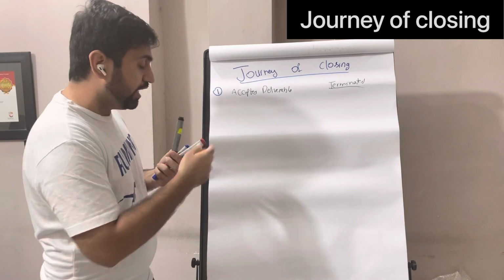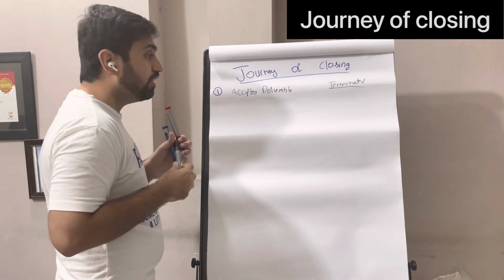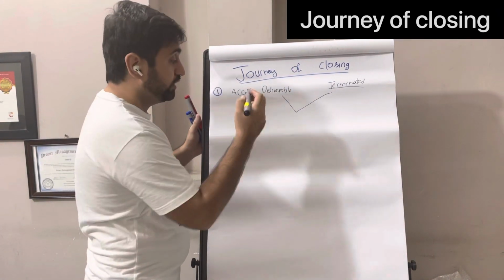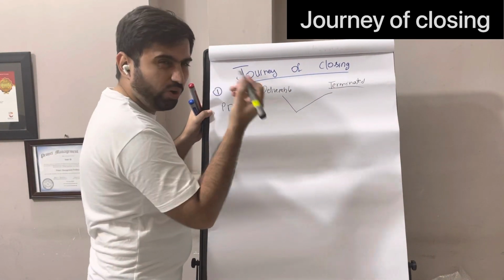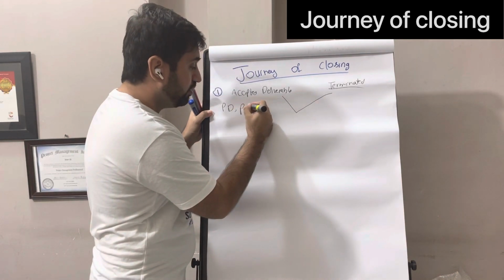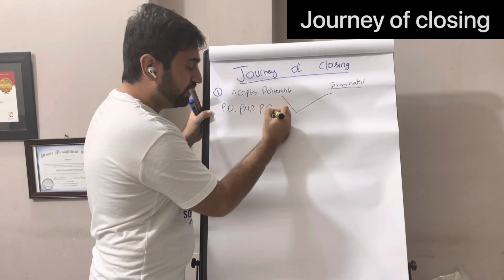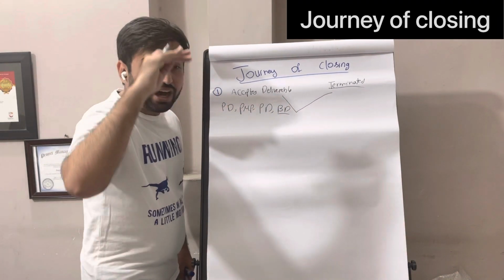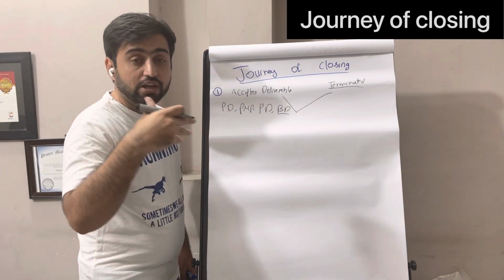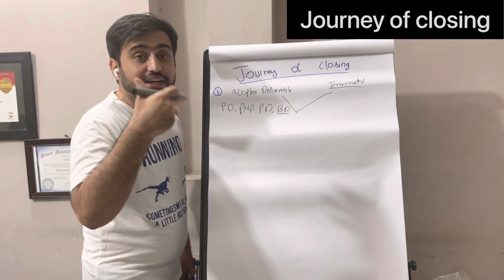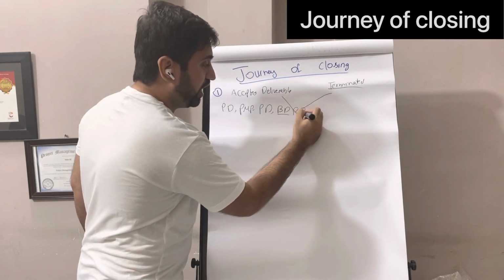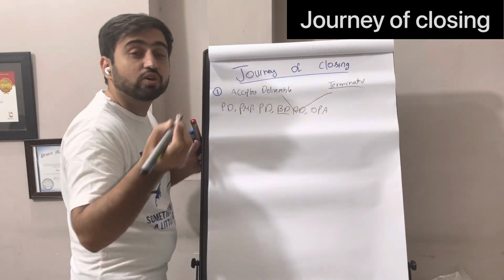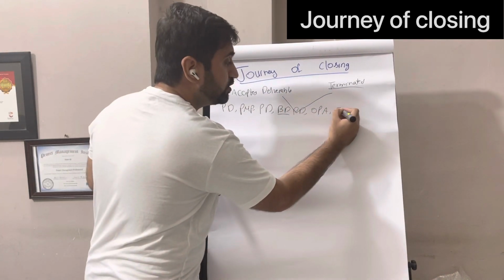Okay, so you got accepted deliverables. All those accepted deliverables are coming down, and they are also bringing a few documents with them for closing. You get all the project documents, all 33 documents, your plan, procurement documents, your business documents. These are very important because at the end you are going to measure how much benefit you have received. What were the benefits that were imagined, and have they been delivered? Of course the project charter, accepted deliverables are always there, and OPAs so that you can update your lessons learned register, and EEFs just to see the context.